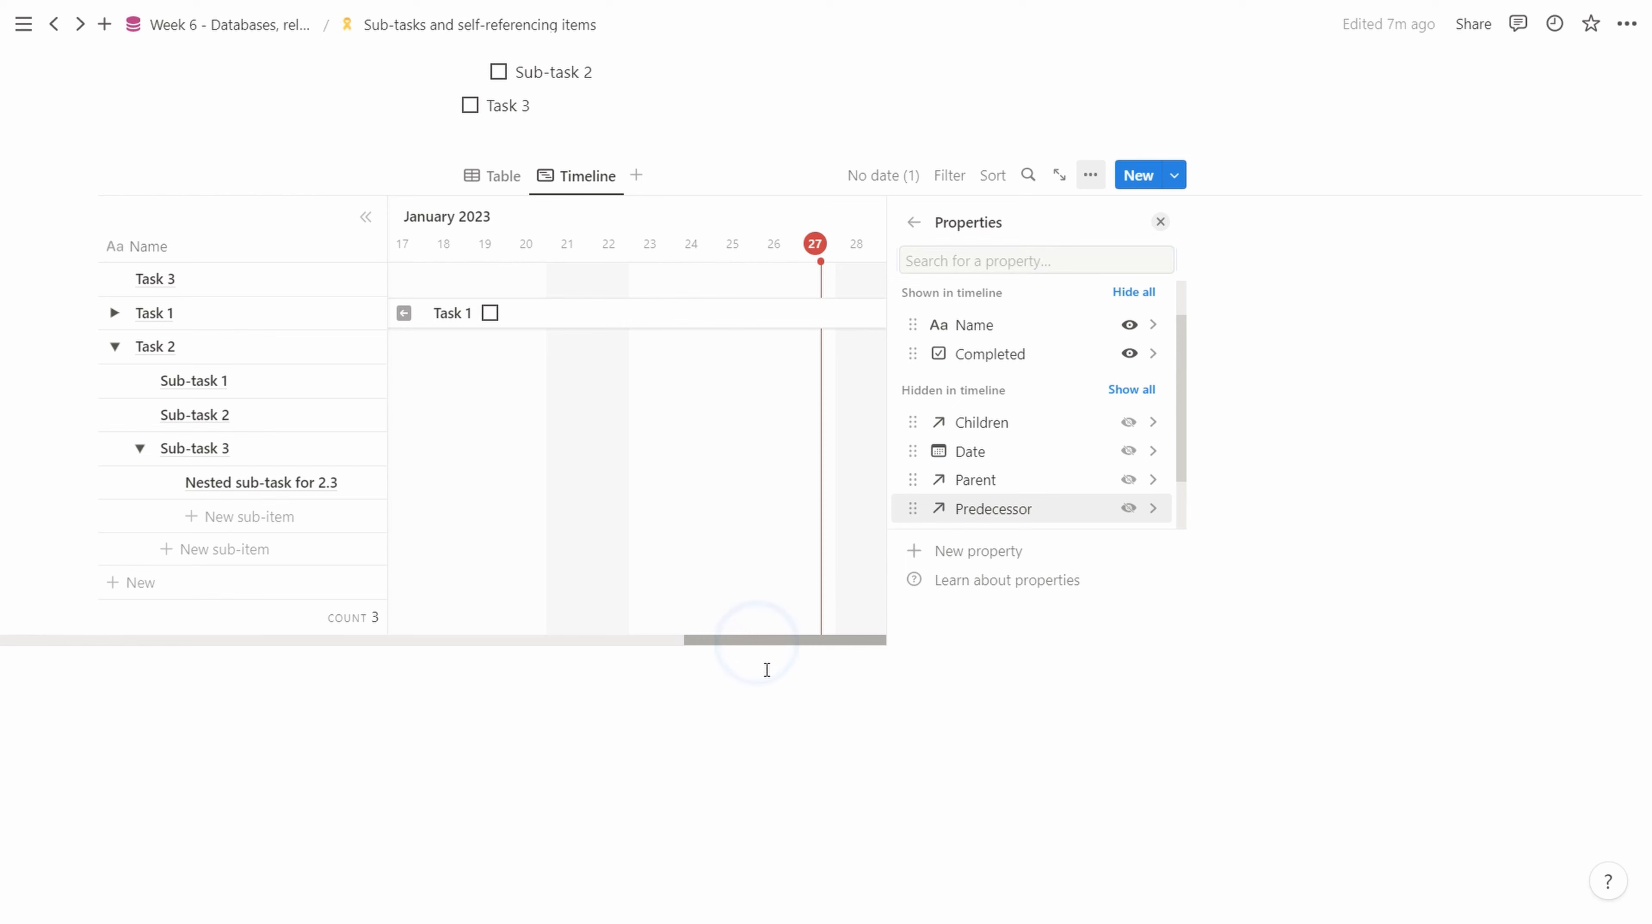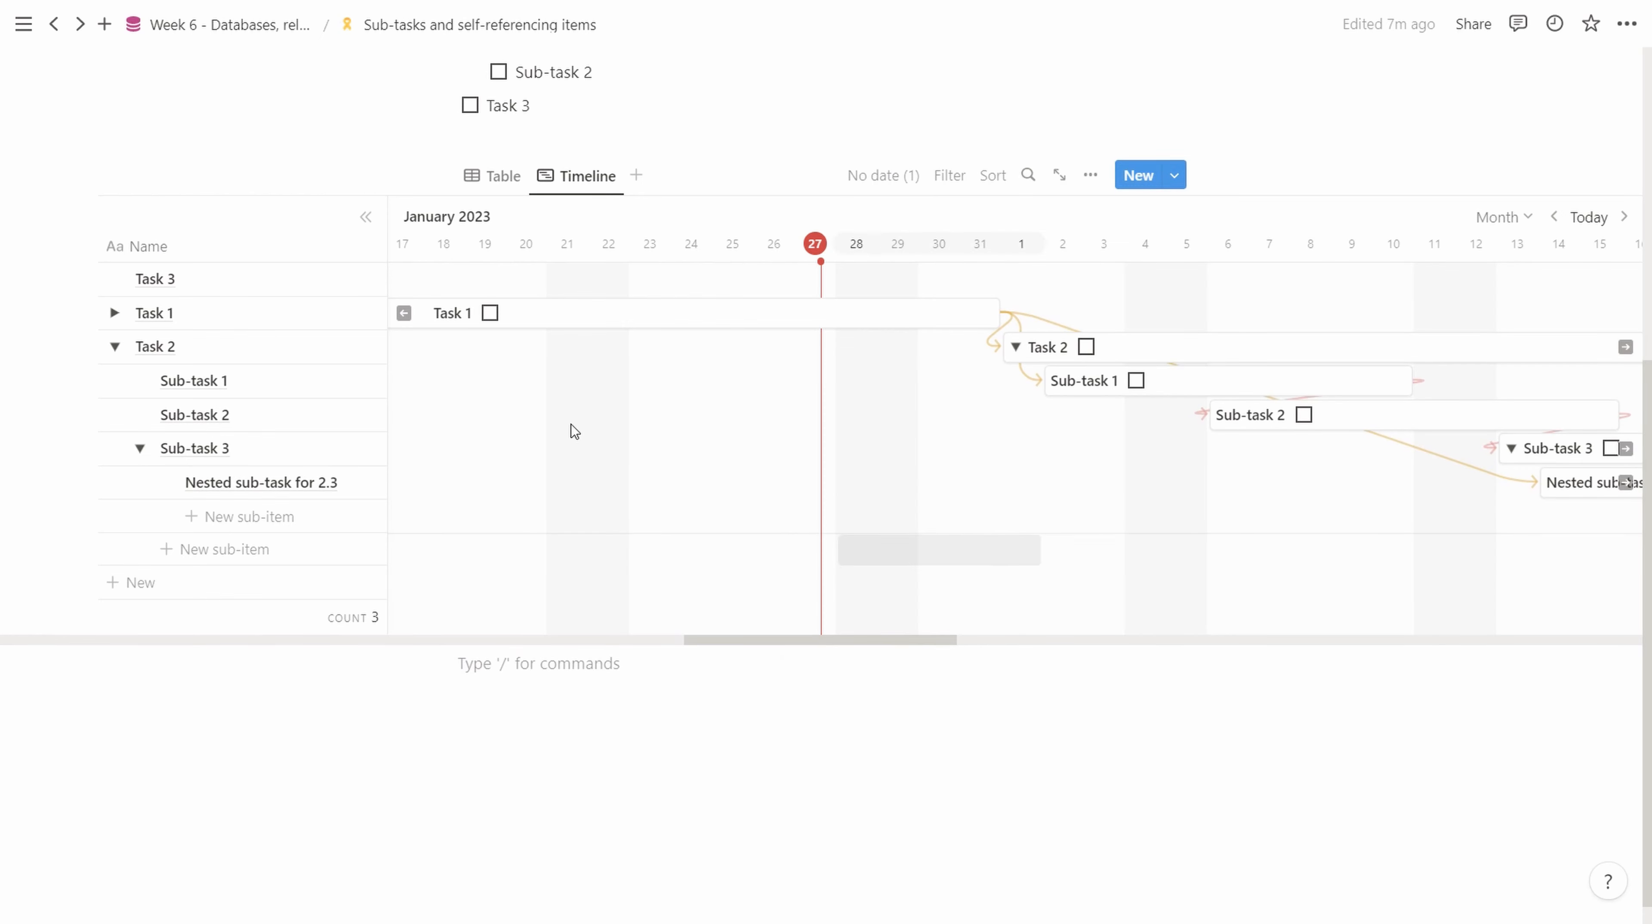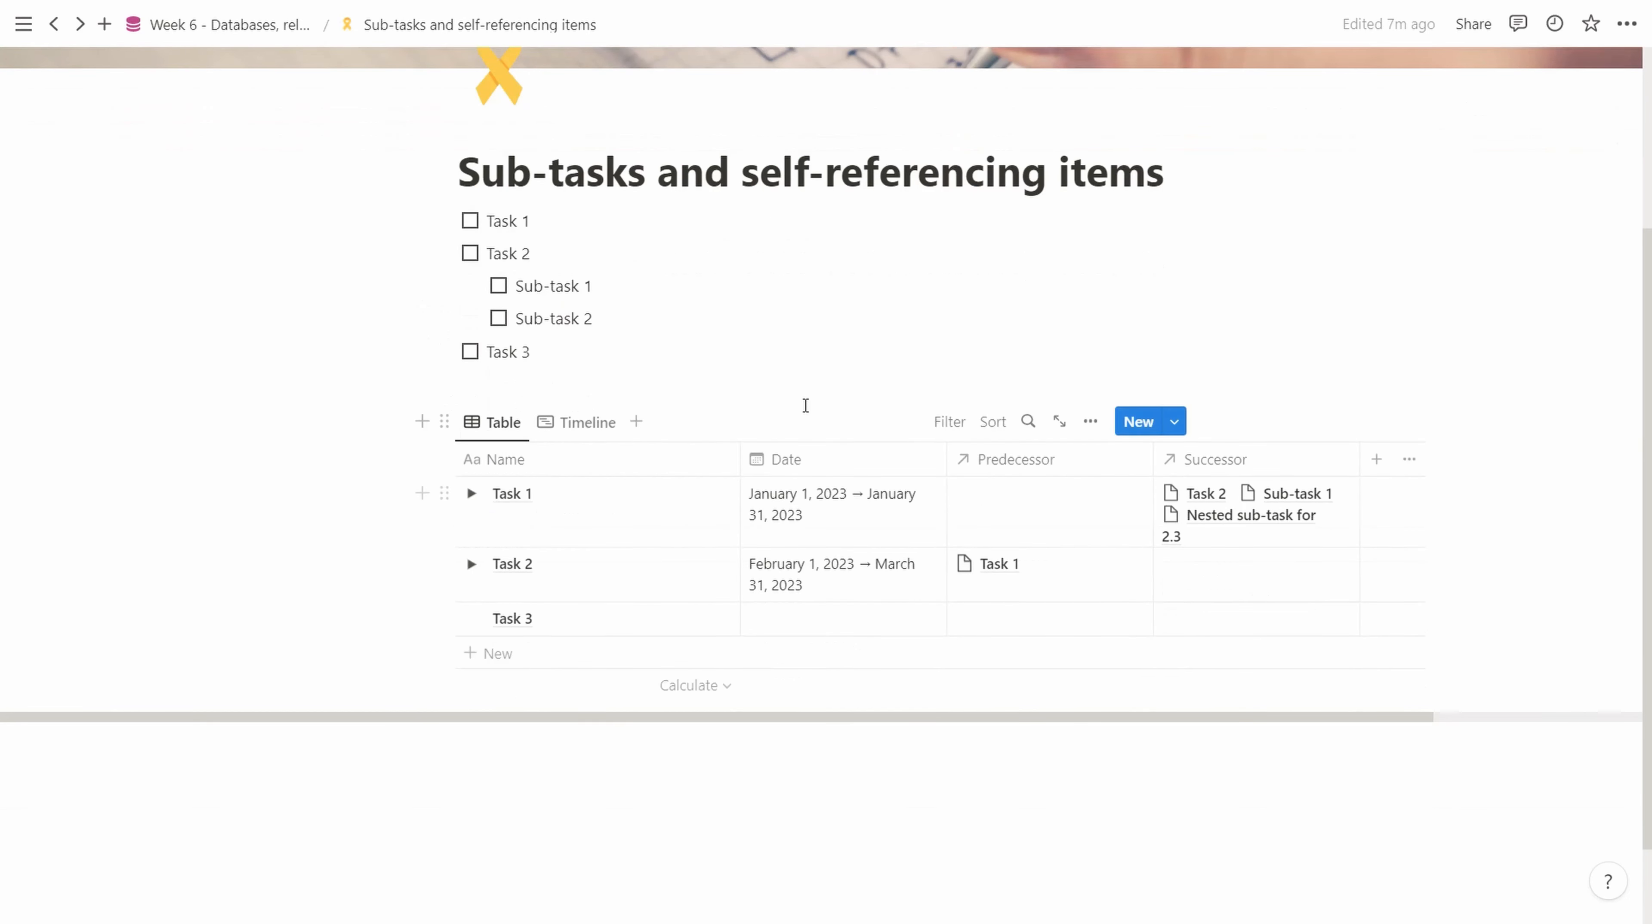Now all of a sudden we can start completing our items in the timeline. We can go back to the table. In the table view, we don't really have the predecessor-successor, the little UI handle we can drag. So if we want to manage those, we need to have those two columns here.